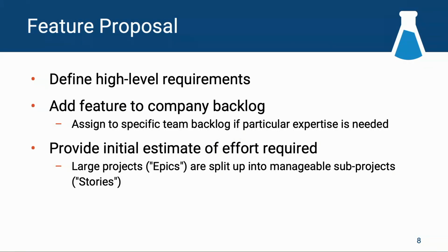The feature goes onto our company backlog, which is whatever project management tool you use to keep track of incoming work, and we try to provide an initial high-level estimate of how long that work will take, and at this point might do initial breakup of a feature or epic in Kanban terminology into more manageable sub-projects.